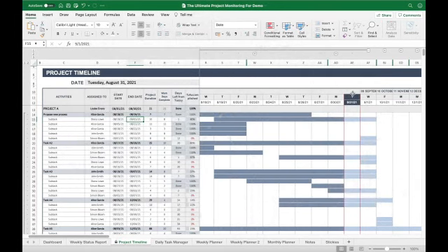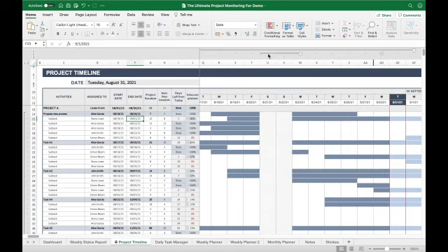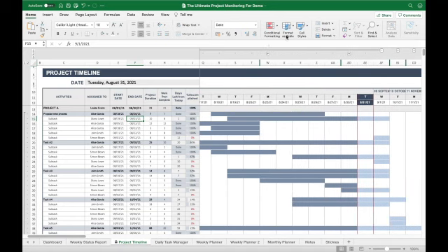As you can see, this is also highlighted to work on your project. In addition to that, when you count the work days complete, it will also show that it is 8 days. So 1, 2, 3, 4, 5, 6, 7, 8. So this just takes into account all the work days. However, the days left from today also takes into account the weekends. How can we show the weekends? You just have to press on the plus button. So if you don't really need your weekends, you just have to press again the negative sign and it will automatically hide. That function is also applicable for the rest of this tab.